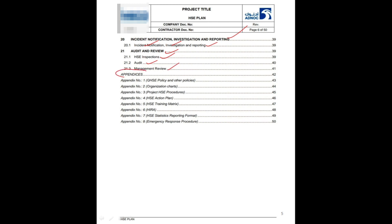Appendix. All appendices will be attached to the HSC plan as large pages. Appendix 1 is QHSC policy and other policies. Appendix 2 is the organization chart. Appendix 3 is project HSC procedures. Appendix 4 is the HSC action plan. Appendix 5 is the HSC training matrix. Appendix 6 is HIRA and risk assessment. Appendix 7 is HSC statistics reporting format. Appendix 8 is emergency response procedures.